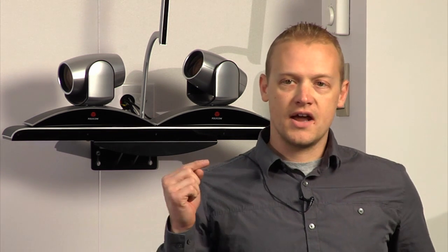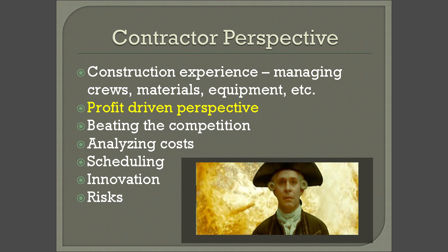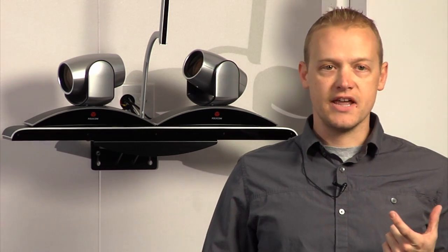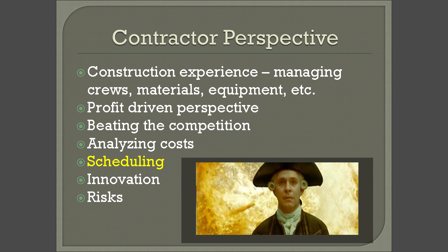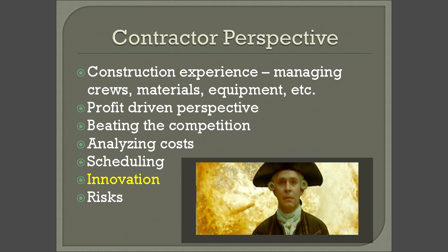The contractor has in his mind what crews he's going to use, how many men, what kind of equipment. He's got to make a profit when he bids these projects that are designed by UDOT and put out. Number one, he's got to beat the competition in order to make a profit, right? So he has to look at all of those things that will give him an edge on the competition. He's got to look at not only how much time it's going to take him to construct the project, but also scheduling the crews that are going to be available, as well as equipment. Like George talked about, knowing those equipment rates and production rates all takes into account the schedule and the usage of those types of resources that the contractors have. They also will take into consideration innovations to give them an edge or to increase their profit margin.